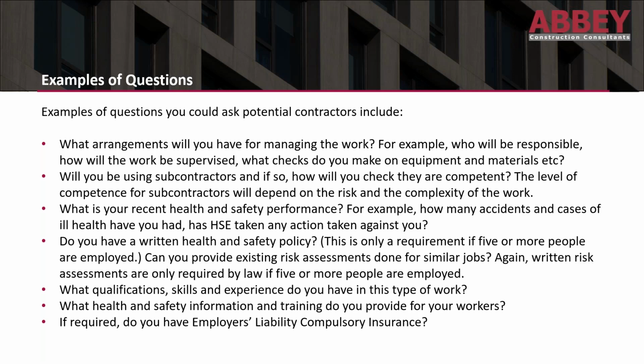But what you can't see from the HSE is if any fee for intervention has been issued. So that would be another question I would ask. Have you received any fees for intervention? And see if they come back with honest replies. Most do. Have they got a written health and safety policy, if there's 5 or more people working for that contractor? And they should have, and they provide you with the statement of intent. Can they give you an example of risk assessments done for similar jobs?